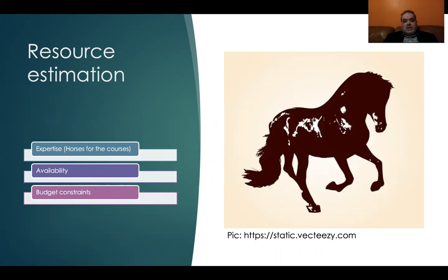Because this is a self-funded project, our company is funding it internally. We have very tight budget limits, and we want to make sure the sequence of tasks matches the schedule of the experts available, whether they are experts from within the company or from our supporting vendors.